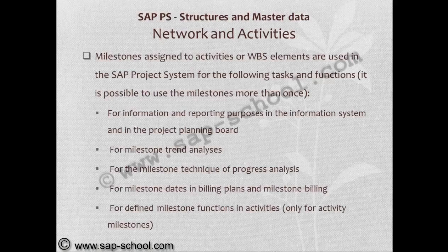Milestones assigned to activities or WBS elements are used in SAP Project System for the following tasks and functions. For information and reporting purposes in the information system and in the project planning board. For milestone trend analysis. For the milestone technique of progressive analysis. For milestone dates in billing plans and milestone billing.